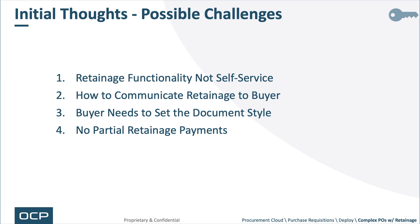Fourth, there are no partial retainage payments — it's all or nothing at the end of the project; you can't pay out some and hold some back. Fifth — and this stands out from a procurement perspective — the way retainage is set up, it holds back a portion of the PO line from invoicing payment. So the line may show as fully paid, but in actuality you've retained 10–15% of it. You may therefore need to account for that rather than showing it all as an expense. These are initial thoughts and possible challenges.